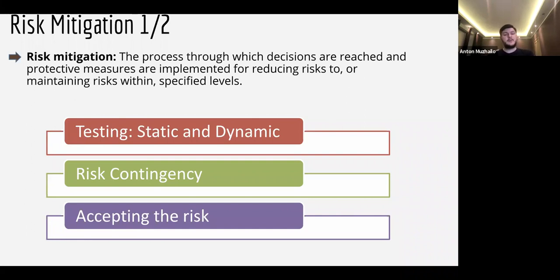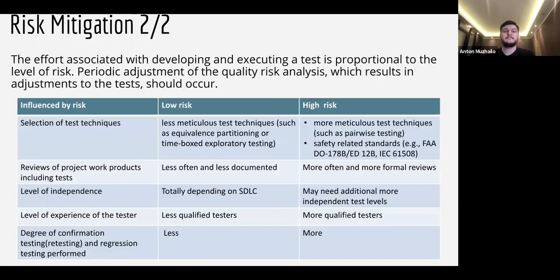And one of the good points is that accepting the risk is also a way to mitigate it. Really, some risks might have very costly mitigation ways, and it's cheaper to just accept it and forget about it than deal with it. So it should also be considered. I'll explain this later when we will be talking about the techniques.